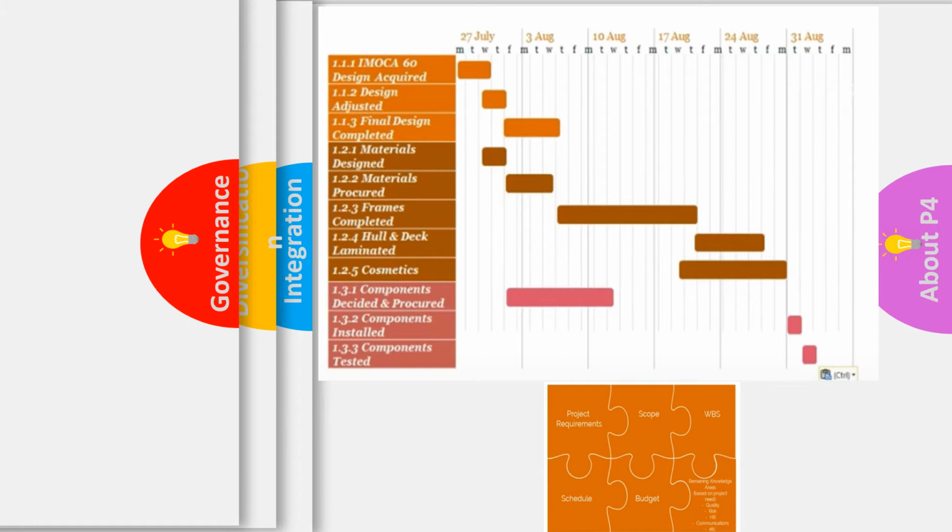You can use Excel, and this is a Gantt chart, and you can put in dates for when specific actions and activities are supposed to occur, and the start time and the finish time, and when some other activities have to occur, but can only occur once one other activity has been completed. So one activity also might be linked to another activity and cannot be done until that activity has been done.